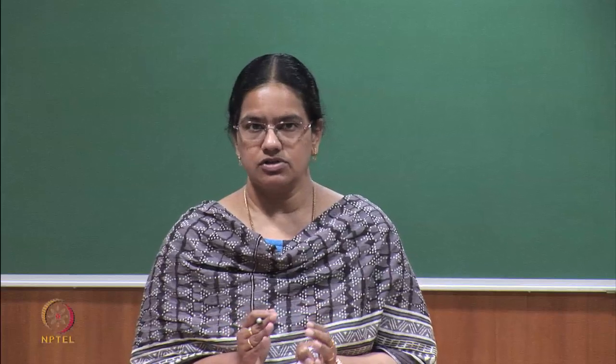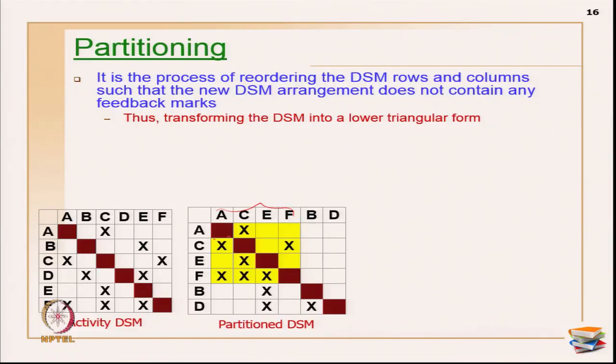Partitioning never talks about relationships within the block, and it never talks about sequence within the block. Here, this A, C, E, F: I have shown that partitioning will not talk about this sequence. So, you have to go through the next step in really identifying what the sequence there is. So, let us now see the definition of partitioning.